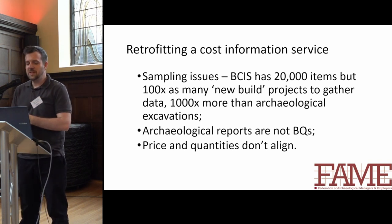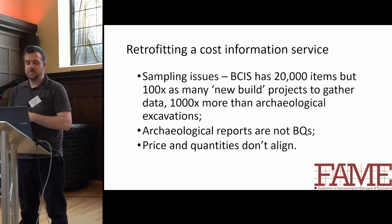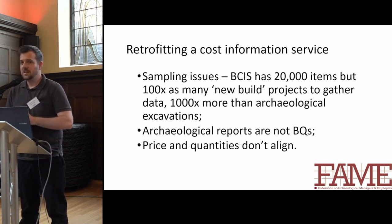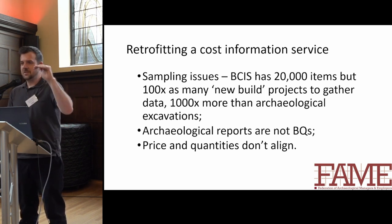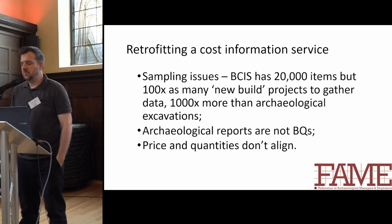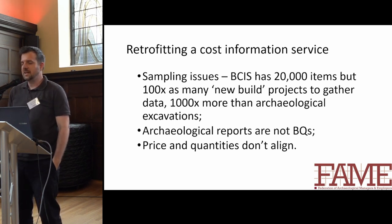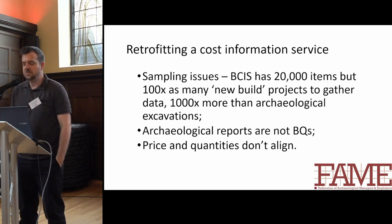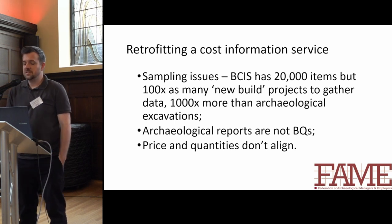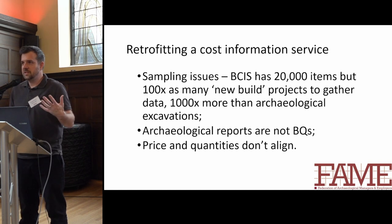We ran into a couple of problems with that. One is just the sample size. The business cost information service — the one used to be run by Ricks, now its own service — has around 20,000 items, incredibly detailed, and it's all from construction projects. Archaeology just does not happen on that scale, so it's really hard to sample for that. There's probably about a hundred times as many construction projects that don't get any archaeological planning, and if you're talking excavation, it's probably about a thousand times as much. So they have a large sample to take from — we didn't.